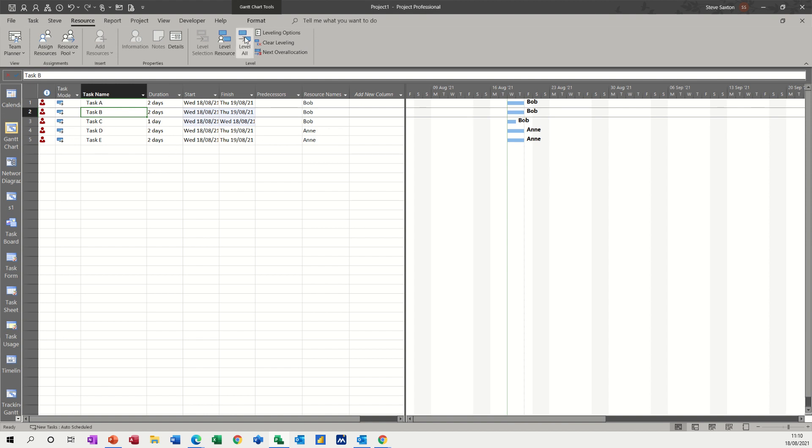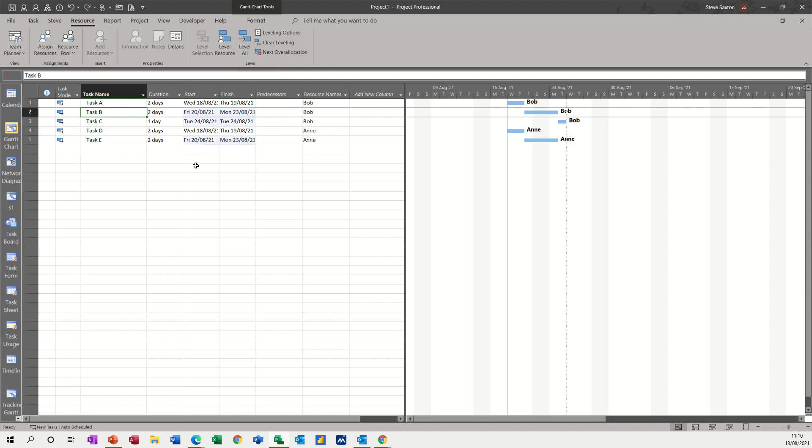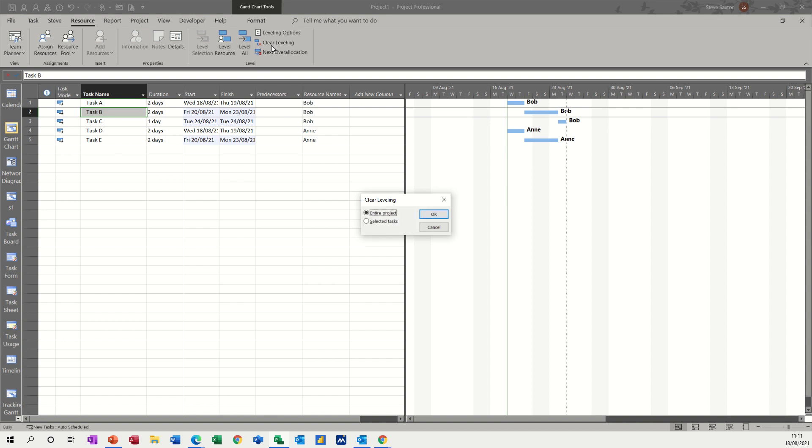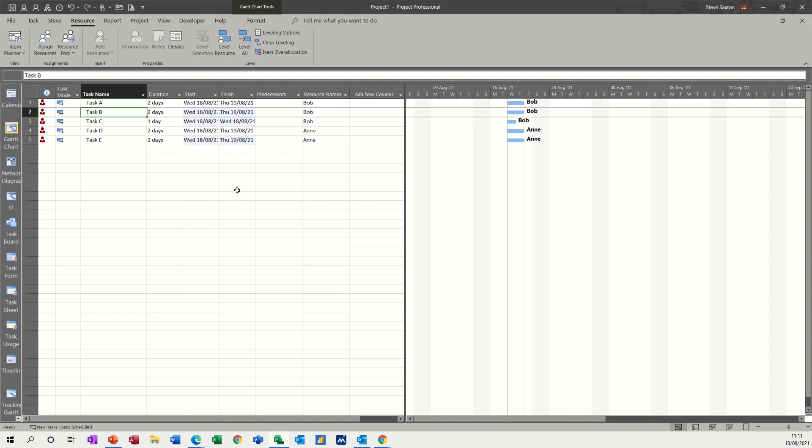Now, if I go for this option, level all, everything moves to accommodate that request. So the three tasks for Bob are the same as what they were before, but now in addition to that, Ann has moved forward as well. So she's now no longer over allocated. And then you can clear leveling to bring all that back like so.